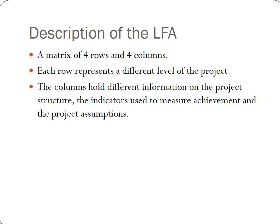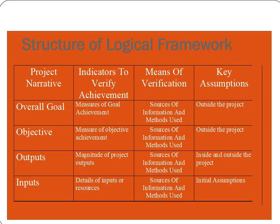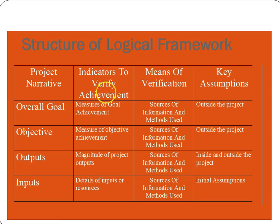As you saw on the diagram earlier, a logical framework is a 4x4 matrix. Each row represents a different level of the project: goal, objective, output, input. The columns represent different characteristics of each of those levels: the narrative, the indicators, the means of verification, and the project assumptions. Sometimes people refer to these as indicators of success and then means of verification or means of evaluation.